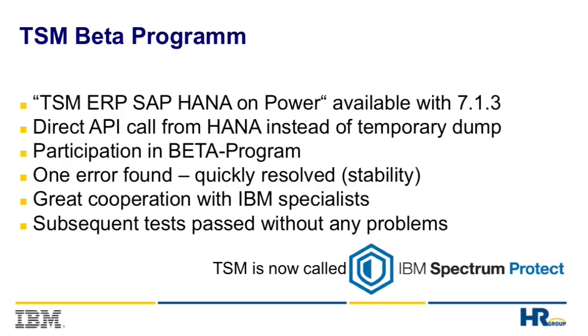The TSM beta program for getting the backup set up: yes, we started right after or during the ramp-up, internally at IBM as well, because from my perspective it was clear the customer can only go productive when he also has a backup integration.